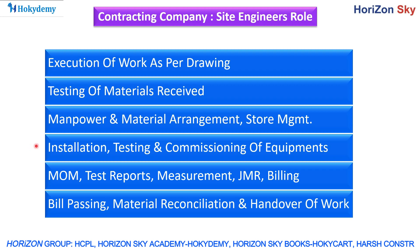For installation, testing and commissioning (ITC) of different equipment, the site engineer from the contracting company handles the installation completely — whether equipment or machinery. Testing and commissioning is mainly done by vendor and supplier engineers, who educate the client team and contracting team, and upon successful testing, commission or hand over the equipment to the client and contractor.